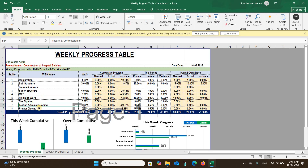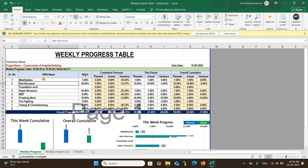Depending on that, you can write your activity list or WPS main heading list. You can also assign weights — the weightage of your activities or WPS. Depending on the elemental structures, you simply break down the percentage weightage of the WPS. It will sum to 100% overall, and within that 100% you break down which activities get what percentage relevant to their value.